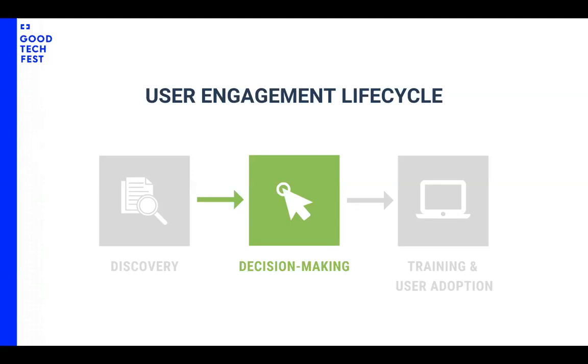And in terms of the ability of the staff and the teams that you're working with, how much time do they have to dedicate to this? And how much time do they need to test the solution and to adopt the change? And this will determine how fast you can deploy the solution.